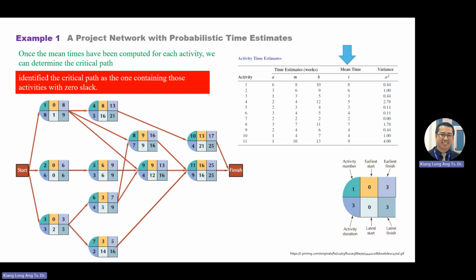All right. So we have learned about forward pass. Forward pass, usually we start from left to right. Let's say the one that you see on the whiteboard here. Usually this one is 0 because nothing in front. How to get the number here? You just add 1 plus 0, 1. So then you pass the number to here. You pass the 1 to here. Then you add the number here, then you need to choose already, 4 or 5. So forward pass, choose maximum. So choose 5 here. Careless mistakes are here. One this wrong, then the rest wrong.